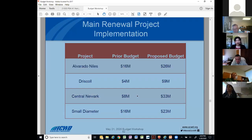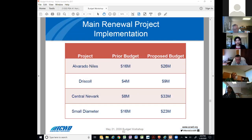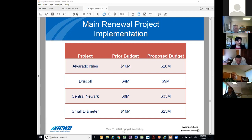This is Judy. I have a question: what's the cost for the huge jump in budget for Central Newark? These projects are complex — there are multiple phases within them. Our original estimates for main renewals were somewhat disconnected from the true market, and the unit estimates weren't a true representation of some large projects. These are not simple open-trench construction projects. Now that we are looking at the recent bids received, we have noticed the increase in unit estimates. So the actual increase is not due to a delay in project initiation? Correct. Thank you.